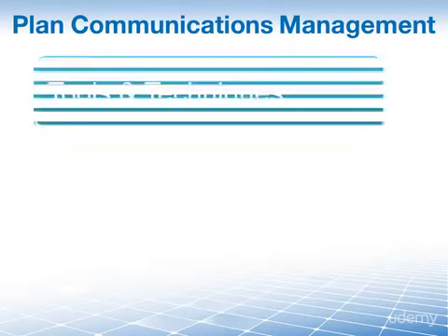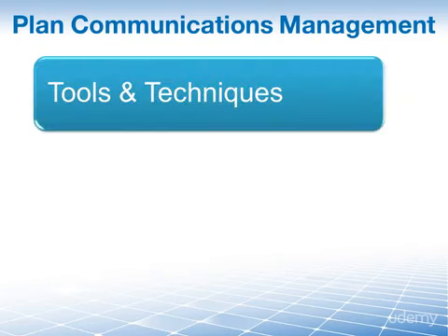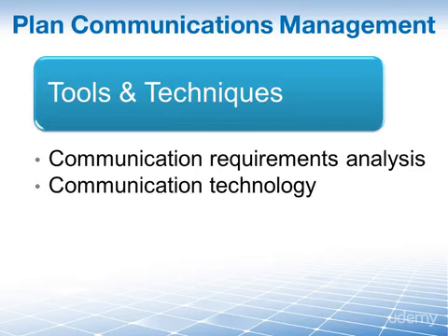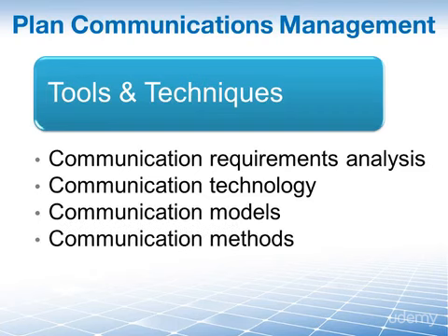We have 5 tools and techniques in this process. The first 4 are communication requirements analysis, the communication technology, the communication models, and the communication methods. And there's something very interesting that I noticed just before I started recording this lesson here. The 5th tool and technique is meetings, and we are currently in a process that contains the word plan communications management. So we use meetings to do all our planning.